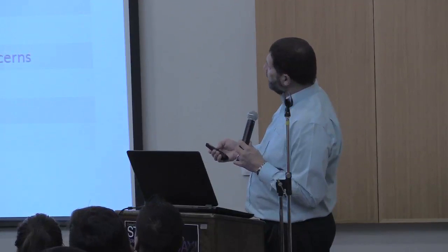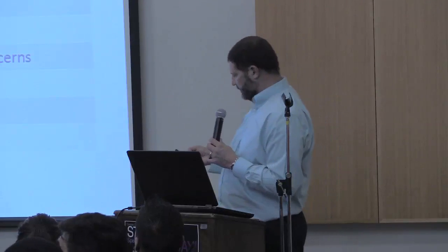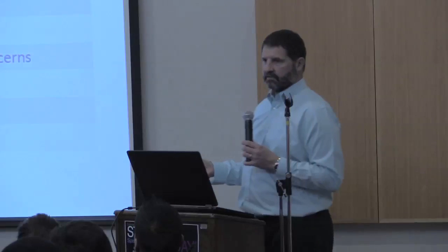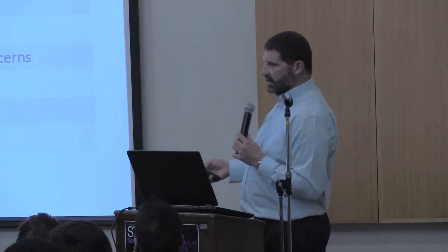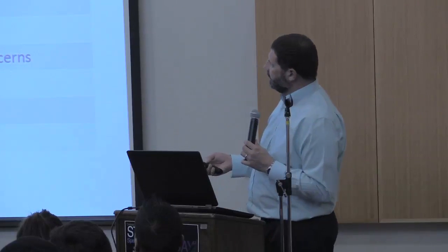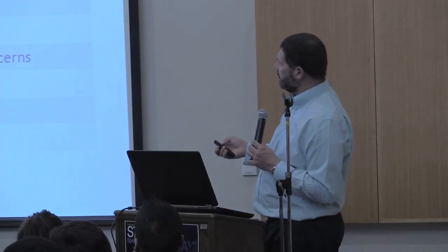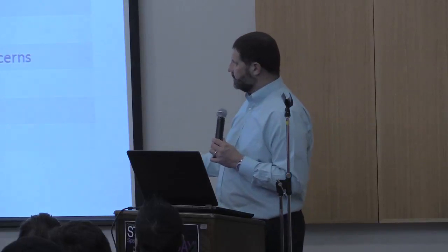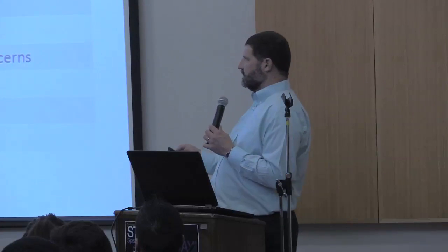And then this is part of the philosophy of designing it. So we want to turn our problems into opportunities. If you see a problem, it's actually an opportunity. So if I have a design process and I'm missing data, well, I can put a checklist together for that. Or if I have incorrect data, I can do a design review. Or if there's obsolete data, I can put a confirmation process.